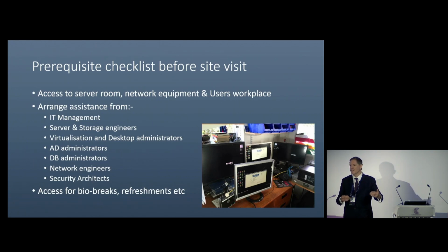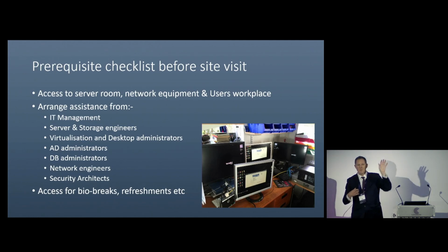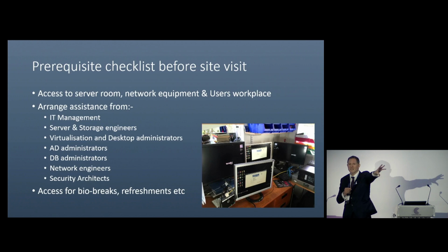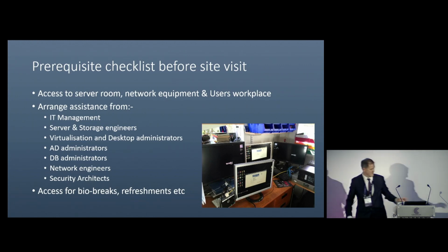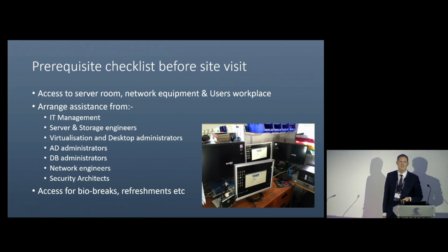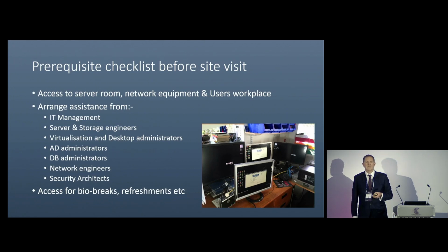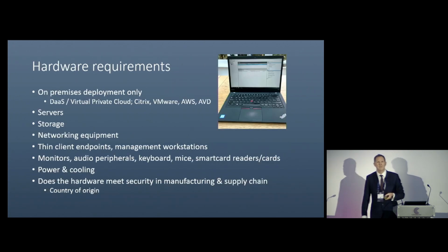How many of you have done this in disconnected, that you've actually built a test lab in your system, disconnected it, and then took it to the customer? Anyone? Okay. We need to do this because there's going to be some software or hardware that's going to try to go out to the internet to do something. So it's always best to test. Yeah, it's a messy room.